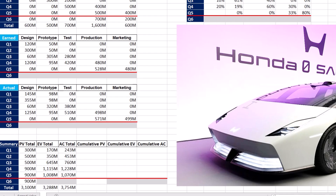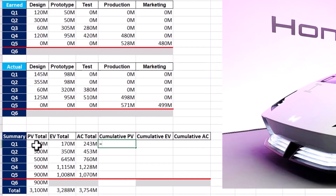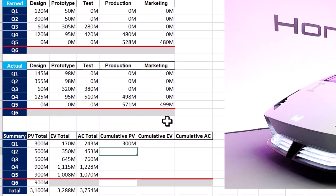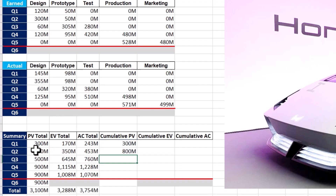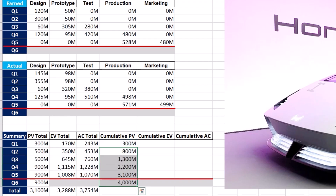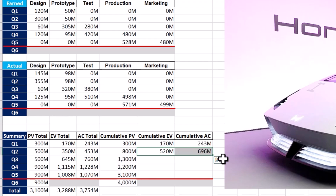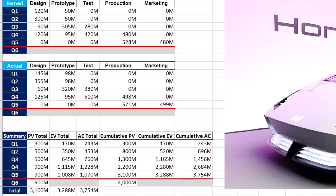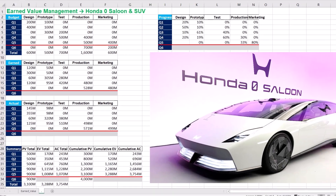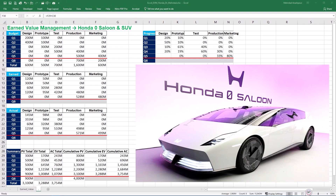Finally, we need cumulative figures to draw earned value S-curves. Cumulative PV in the first quarter is $300 million, and in Q2 it is the sum of cumulative PV in Q1 and Q2's PV. The formula is then replicated for other quarters, and the cumulative PV or project budget at completion is found to be $4,000 million. Cumulative EV and cumulative AC are found in the same way. These figures offer a quantified view of where the project stands, and we will draw S-curves for our earned value analysis in the next step.